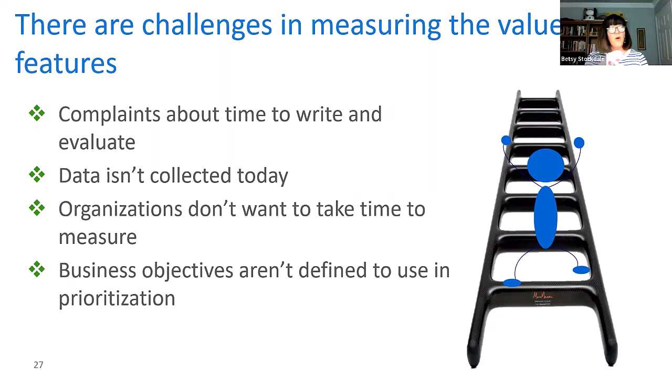And all of a sudden this new set of features came up that didn't map back to many of my business objectives. And so we had to stop, right? And pull the key stakeholders in and say, what I'm hearing here doesn't map back, right? Did we miss something on our model? Completely possible, right? Completely something that we totally missed. Or is it something that we're seeing that is scope creep, right?